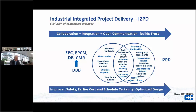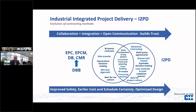Through the middle, EPC or design-build type models may use early involvement of key stakeholders, early contractor involvement, front-end planning, 3D modeling, or partnering sessions. But they're transactional contracts versus the relational contracts of I2PD, which is on the far right. I2PD utilizes multi-party agreements where everybody sinks or swims together. It applies lean methods and tools, and instead of a 'best for me' culture, it's a 'what's best for project' culture.